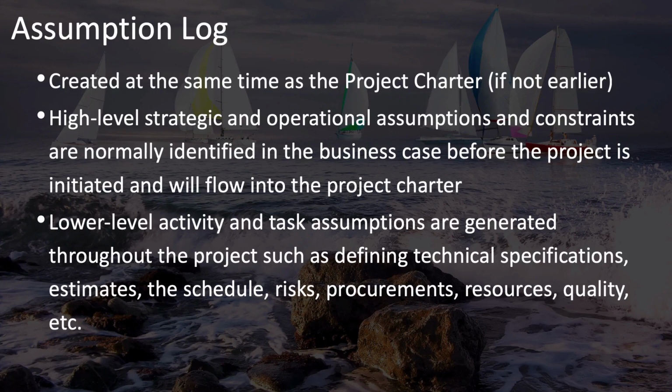You may also assume that prices of key commodities such as copper would stay above, say, $2 a pound for the next 5 years. You need to check on that periodically, because if your project is dependent on that price and the price doesn't hold, then you need to reassess whether the project is still worth pursuing or should be put on hold.